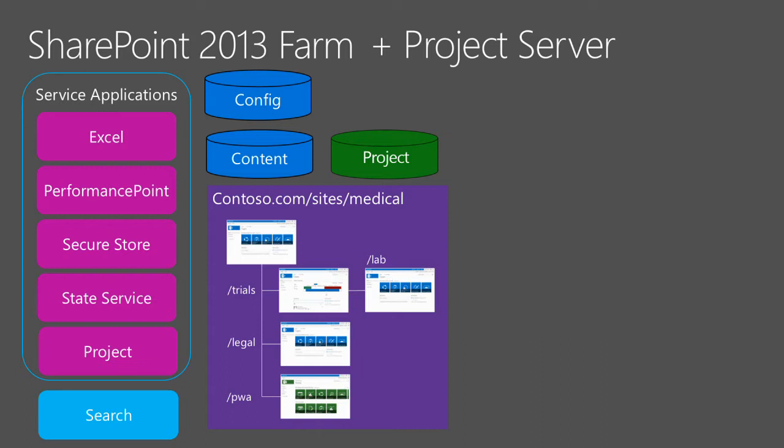So all the information is actually pooled in one place, and if you think about it, that allows us to light up scenarios where you might have more than one project, and you have Bob, who's the star developer, and you want him on your project. You can try to assign him a task, say he starts on Monday and is going to work on your project for two weeks, but I'm a project manager, and I want Bob on my project as well. So I can try to assign him work, but I can tell right away that Bob is already allocated to someone else's project. By having all this information in one place, that gives us the ability to do resource capacity planning and resource leveling.